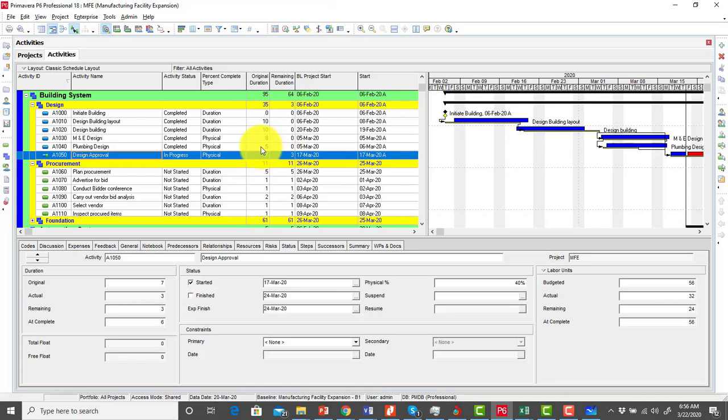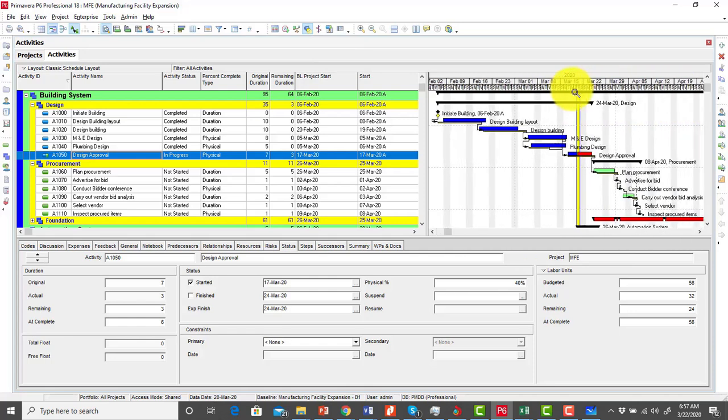The key thing that we try to illustrate here is the fact that when executing starts and you begin to get report about work as it is being done, this is exactly how you're going to be updating it. Say for example once a week. So all you simply need to do is turn on your progress spotlight, and then move your progress spotlight to the relevant week where the update needs to be done, and then do the update on your status tab.